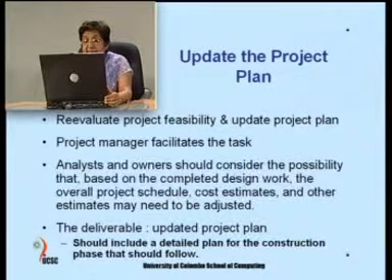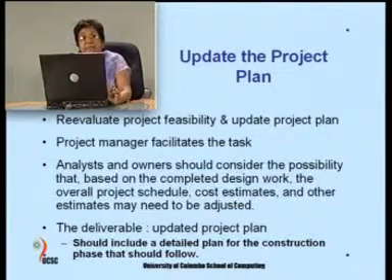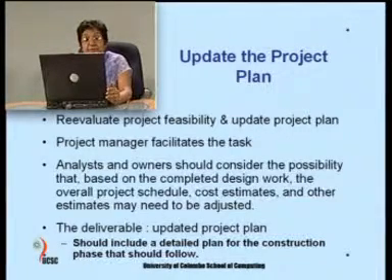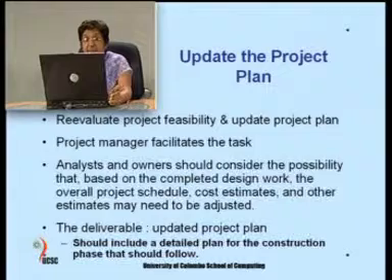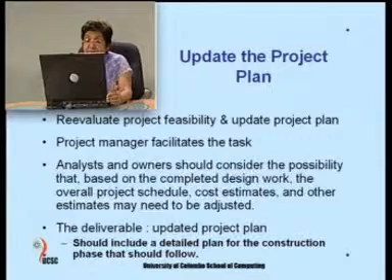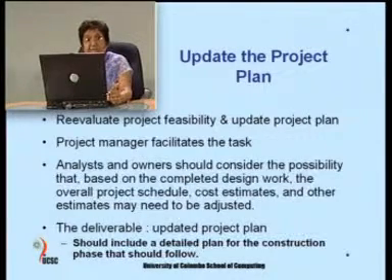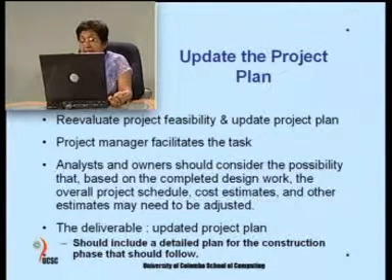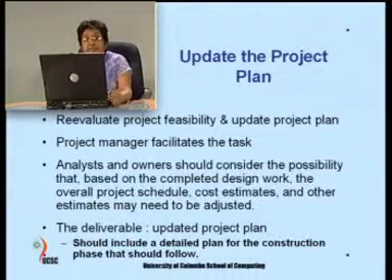Analysts and owners should consider the possibility that based on the completed design work, the overall project schedule, cost estimates and other estimates may need to be adjusted, because this is a point in the system development life cycle where you can rethink whether what you have done is sufficient, or whether you have more work to do in the form of designing, or whether you should go back to certain stages, or whether this is feasible at all. This may be another point at which all these decisions have to be made.